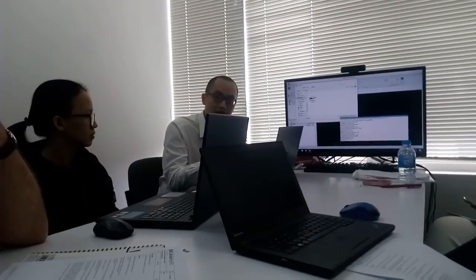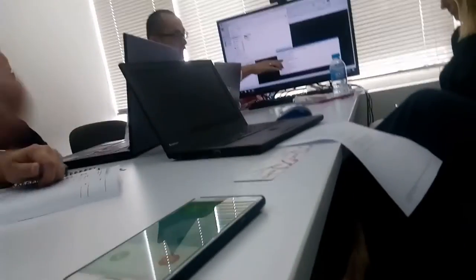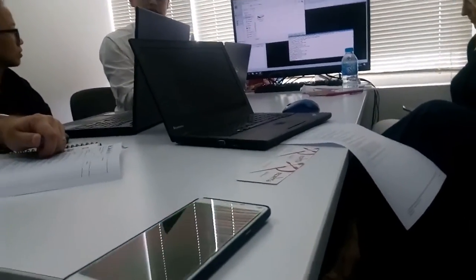Which, when they export to IFC, there is information loss during the process. So when you come to CostX, you cannot grab the full information. So we advise going for DWFX, which is the most complete for the BIM model.